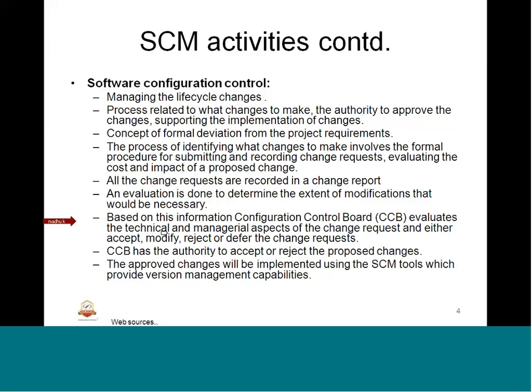The CCB evaluates the technical and managerial aspects of the change request, and either they will accept it, ask for some changes in the updates that are required, or they may defer it or reject the change request. So the CCB has the full authority to accept or reject the proposed changes. The approved changes will be implemented using the SCM tools. It is the configuration control tool that will be used, which provides version management capabilities. So these changes have to be definitely controlled. That's what we do with the software configuration control.